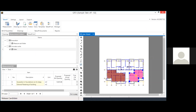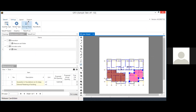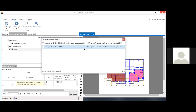For the upcoming 3D takeoff, you take a 3D model from Revit, export it as a Navisworks file, and open it in Candy. There is already an option for Navisworks format in the software. You will need two setups from Navisworks which will help you perform 3D quantity takeoff directly.